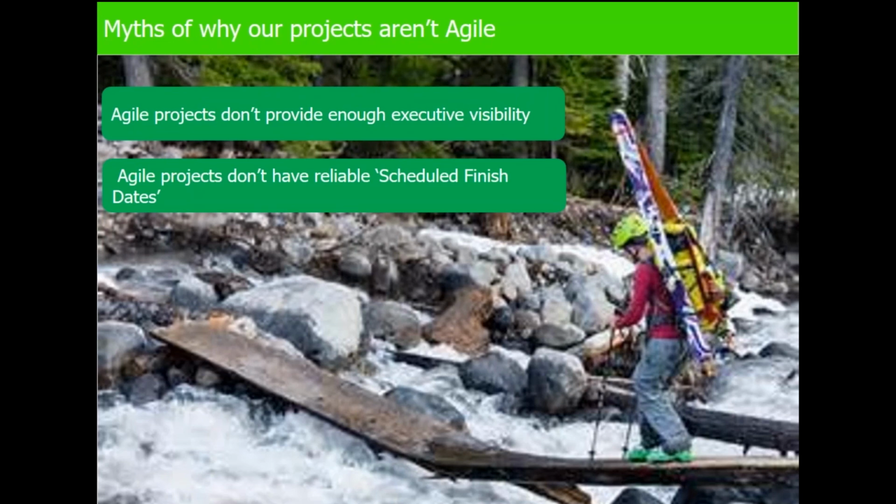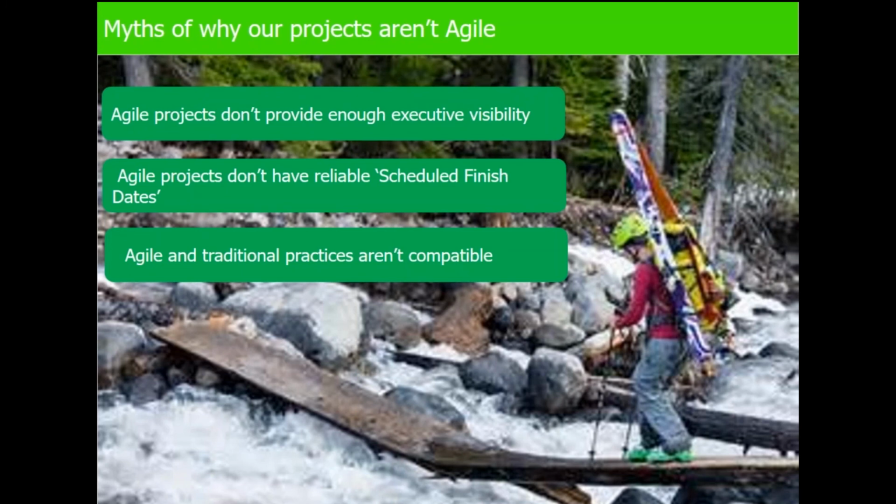It's true that agile teams use just-in-time estimation for iterations and focus on delivering business value incrementally. However, release and roadmap planning is used for longer range estimates. The use of epics, for example, or large stories and themes, groups of stories, can be used to estimate work that still requires detailed scoping. To be able to estimate with some degree of reliability, an agile team will need to have normalization around the size of stories and understand their velocity, right? Story points delivered in an iteration.